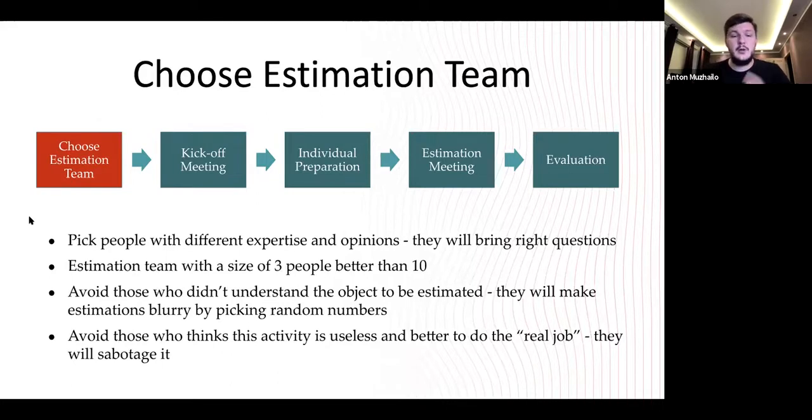If you call just one meeting for 1 hour, but for the entire team, you don't spend 1 hour. You spend like 10 engineering hours for this meeting because there are lots of people to attend. But what if you can arrange this meeting with just 3 people because you need only opinions from those 3 people? You don't need the others to listen, right? You can send an email and tell them after, right? So you can spend 3 engineering hours instead of 10.